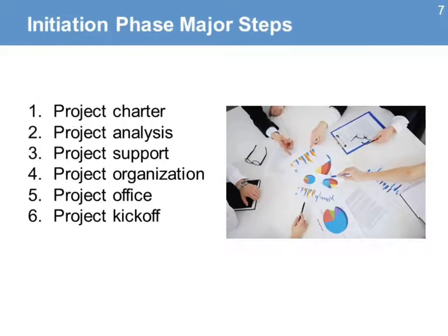The initiation phase has these major steps. The first step is the development and approval of the project charter, the document that defines the project governance. The next step is the analysis of all project documentation, including the project proposals and contracts. The next step is finding and indicating the commitment and support to the project from various internal and external stakeholders.